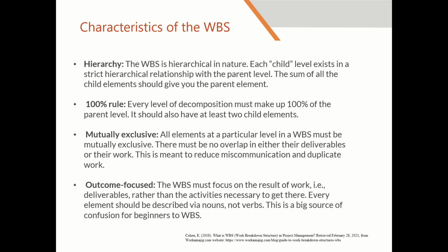So the hierarchy: the work breakdown structure is hierarchical in nature. There are child levels that exist in relationship with the parent levels, and the sum of all the child elements should give you the parent element. Every level of decomposition must make up 100% of the parent level. It should also have at least two child elements.